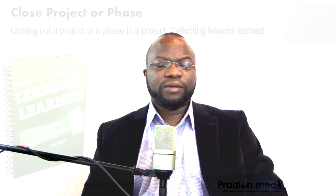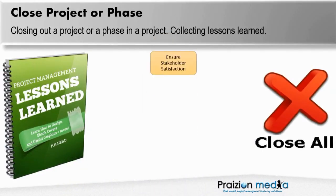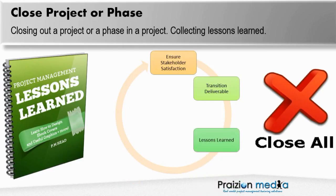So you're closing out either a phase or a project, and a big one, you're collecting lessons learned. What are some of the things that happen as you're closing out the project or phase? First of all, you want to ensure stakeholder satisfaction. You want to transition the deliverable to the customer. You want to carry out your lessons learned. And of course, we're talking about the overall lessons learned. This is where you're compiling all of those lessons learned that you've been collecting already throughout the project.